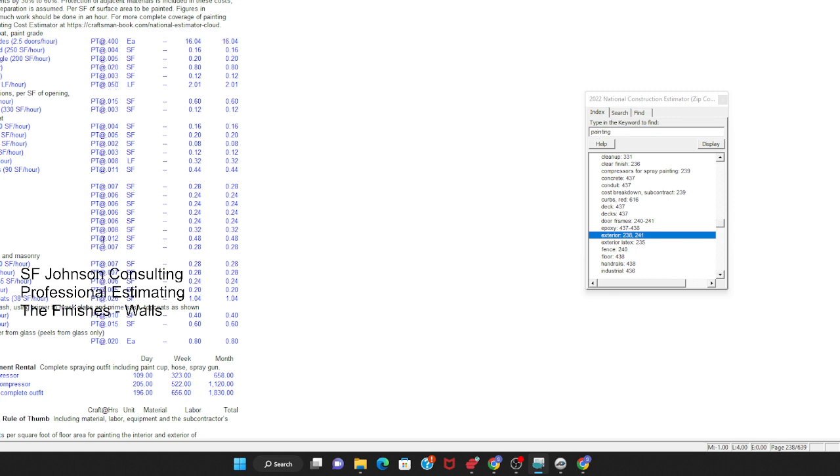But again, all of your linear ones are pretty much very labor intensive. 0.008, as opposed to 0.004, 0.005, you know what I mean? Bookcases, yeah, that's the whole bookcase. Cabinets. So yeah, 0.011 because we're talking cabinets.